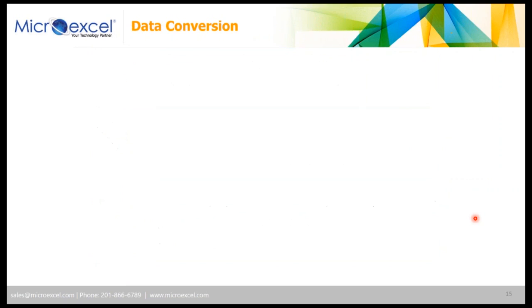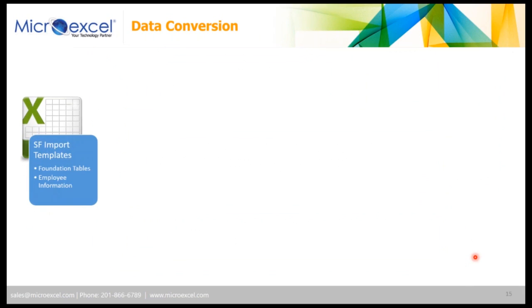One of the biggest challenges always is the data conversion. And having done so many conversions over so many years, it starts all with the import templates. Usually SuccessFactors will provide a whole set of templates to load the data. We will have the foundation tables, like the department structure, etc., and we will also have anything to do with employee information. We will have the personal details, names, job details, etc.